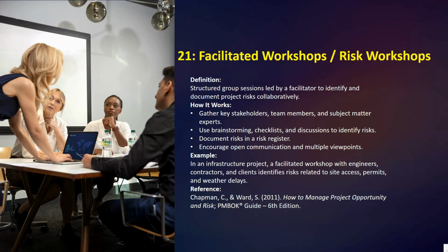Here we have an example in an infrastructure project: a facilitated workshop with the engineers, contractors, and clients identified risks related to site access and permits and weather delays.